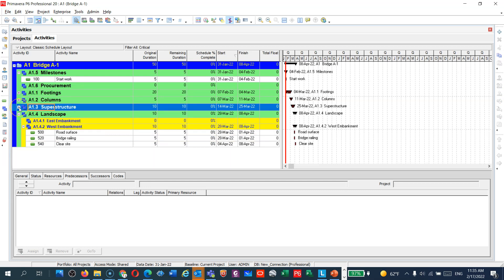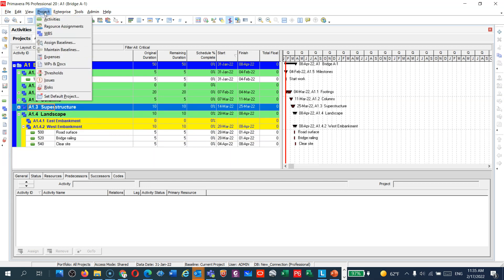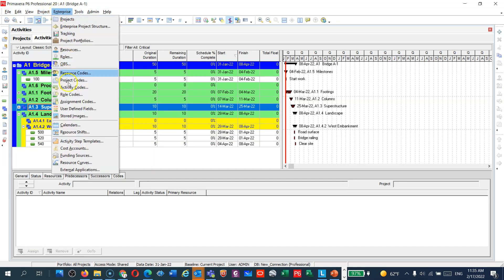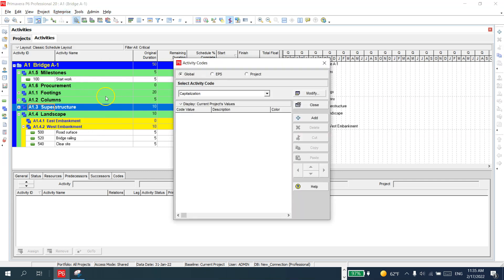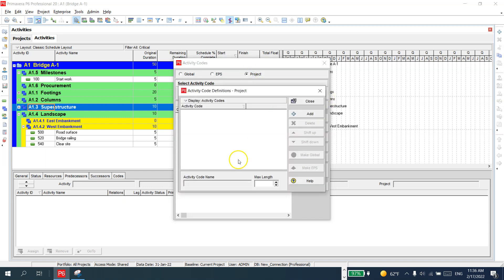To create activity codes, go to Enterprise and you will see 'Activity Codes'. You can make them global, EPS-level, or project-specific. I would like to make them specific to my project. I'll go to Modify, then Add — and I'll name this 'Bridge Codes'.